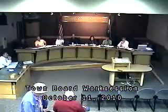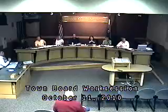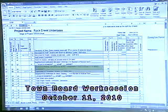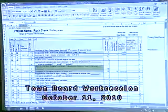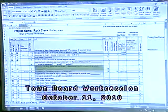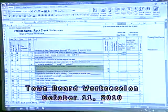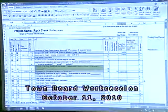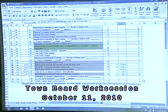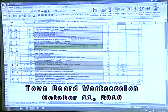Right, I had Jay Wolforth put this together, an example for us, and basically he came up with the Rock Creek Underpass. I think it's one of the 2011 projects that we have, and then he has a going to the staff development with the board in looks like January. And then it jumps to the design work, and then he's got a work session and then board discussion, and the grant application, and then out to bid.